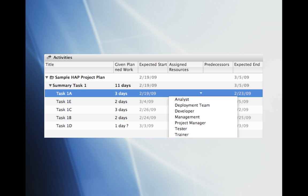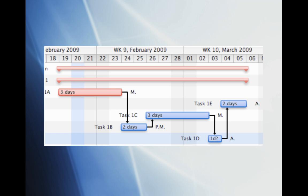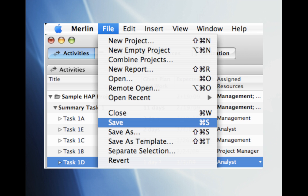Now it's time for us to enter the resources for each of the tasks. For 1A, we'll select Management, 1B, Project Manager, 1C, Management, 1D, Analyst, and 1E, Analyst. After selecting the resources, you'll notice also that the resource initial will be located on the top line in the graph section. Let's go ahead and save our work.